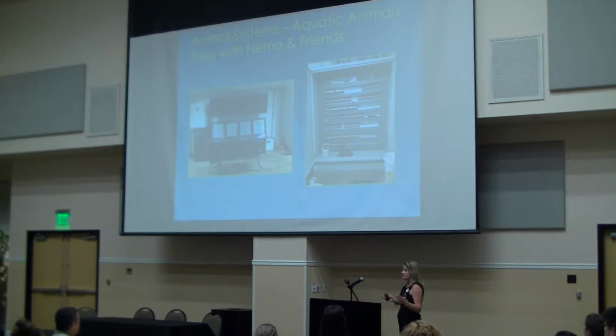Those are the kinds of things that we get involved in. And as a project manager now, it's working with that contractor, tracking them down to pay things out or make sure that we get what the client wants. We didn't plan on replacing as many wires as we did, conductors if you will. Ended up having to replace a lot more. All those things take a lot of effort, a lot of coordination.